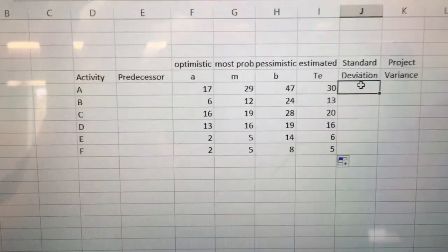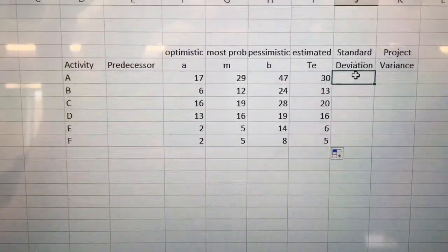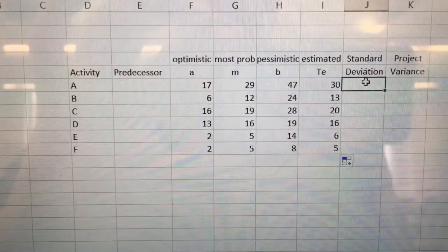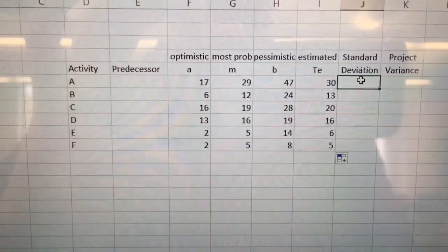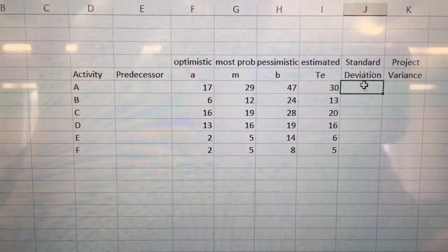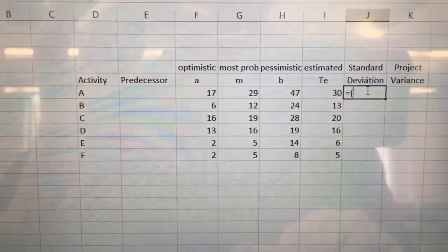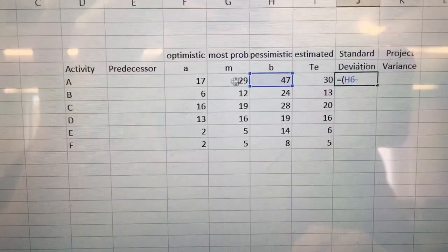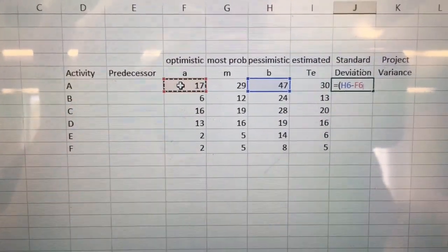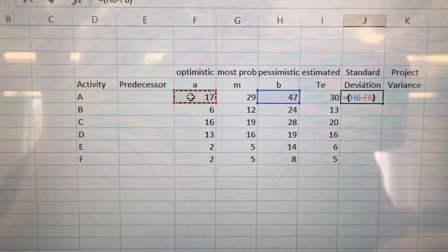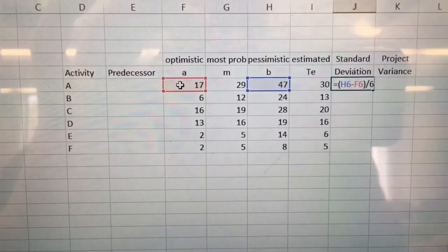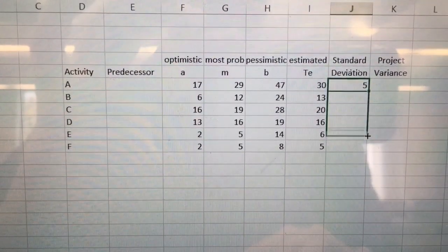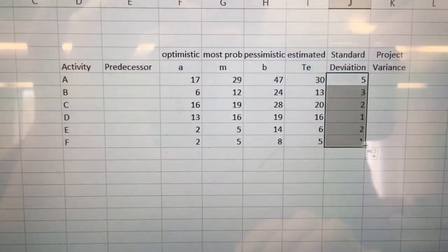Who recalls what our formula for standard deviation is? That's correct, simply our pessimistic minus our optimistic divided by 6. So once again I'm going to do an equal and I'm going to open up a parenthesis. I'm going to put in my pessimistic, subtract my optimistic, close out that parenthesis, and divide that whole thing by 6. Once I do that I can take that number, drag it all the way down, or that formula, and drag it all the way down.